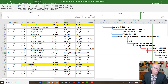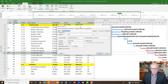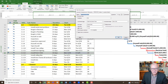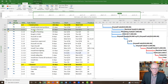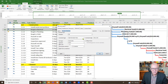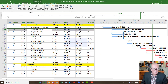How do you fix it? It's not hard. Double-click on the activity to bring up the Task Information box, go to the Advanced tab, and set the Constraint Type to 'As Soon As Possible.' That removes the constraint. I've got one here on Rough In Electrical — double-click, go to the Advanced tab, set As Soon As Possible, click OK. That's adjusted. Now I've got two more remaining.